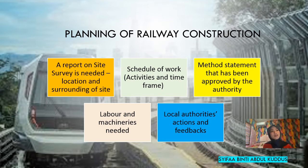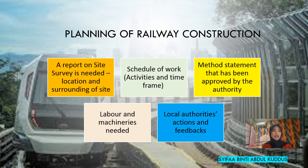Next is planning of railway construction. First, a report on site survey is needed for the location and surroundings of the site. Second is a schedule of work that includes activities and time frame for the construction. Third is providing a method statement that has been approved by the authority. Number four, labour and machineries are needed for the construction. Lastly, local authorities' actions and feedback are important.